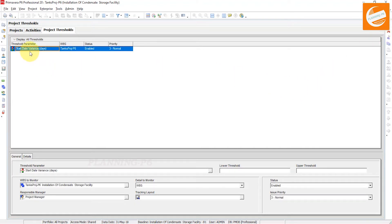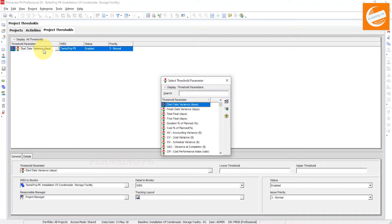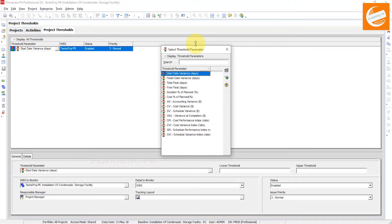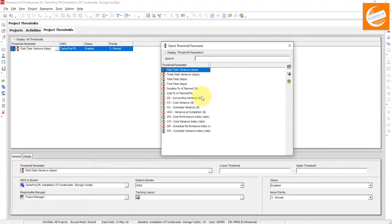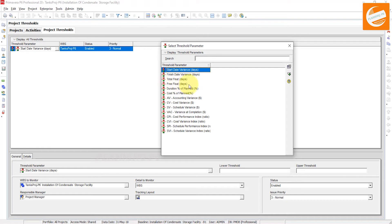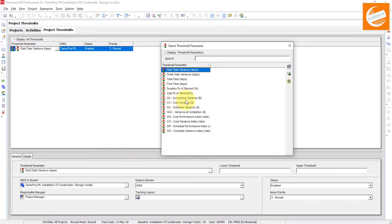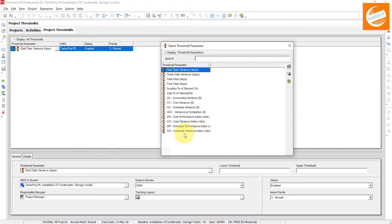Add start date variance parameters. The parameters are here - you can look into that parameter window: start date variance days, finish date variance days, total float days, free float days, duration percent, planned date percentage, cost of planned percentage, accounting variance, cost variance, schedule variance, variance at completion, cost performance index, cost variance index, schedule performance index, and schedule variance index.